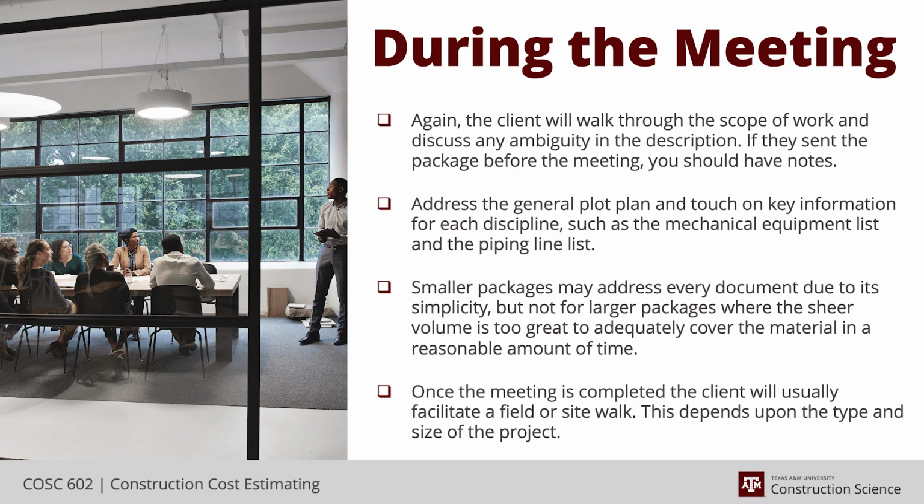And it may vary. On the job that we bid in Kuwait, it wasn't where are the employees going to park and what are the hotels like, it was where are we going to put the man camp, because we had to build a man camp for about 1,000 people. And then we would basically just bus them down the road from the man camp to the job site. And being in Kuwait, everything's basically sand, so we already knew that we had to stabilize and drive piles and things of that nature. But we still wanted at least a couple people to make a basic pass at the site.